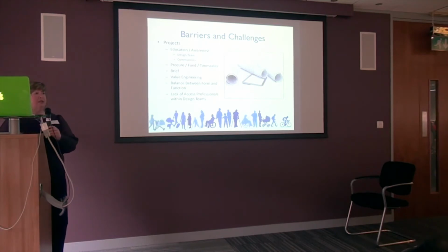To get an inclusive design brief is really important as well, and I think to state the intent at the beginning that you want this design to be accessible and inclusive. The Queen Elizabeth Park in London, has anybody been down there? No, I would encourage you to. Did you like it, Paul? Yes. And the intent, every design meeting for that project, the intent was to reinforce this is going to be the most inclusive games ever, this is going to be the most inclusive park ever. And the client set parameters to the design team of the gradients that they wanted, so that as many barriers were removed as possible.